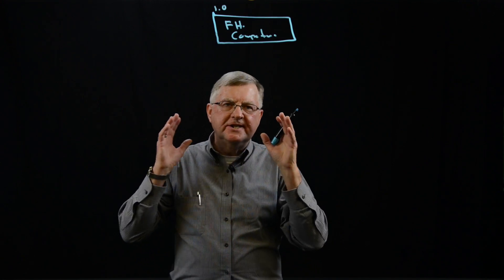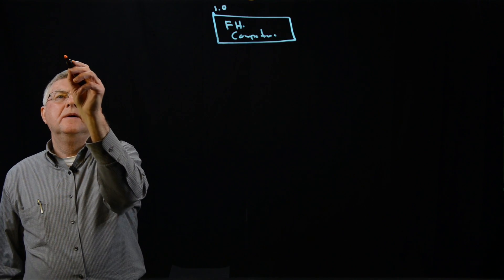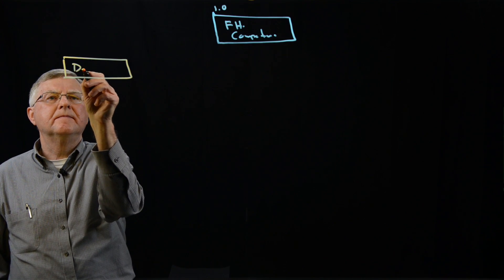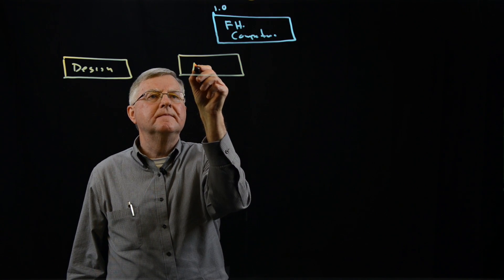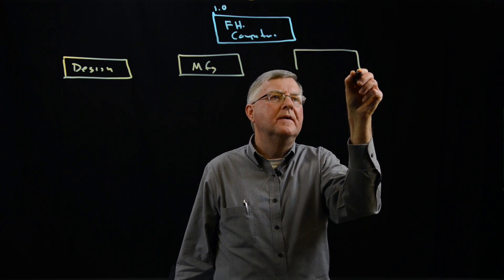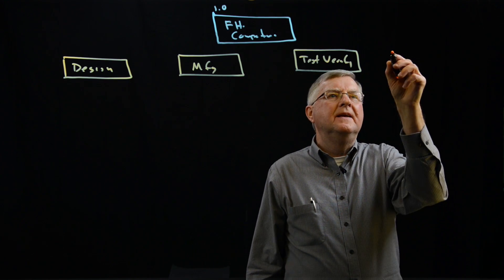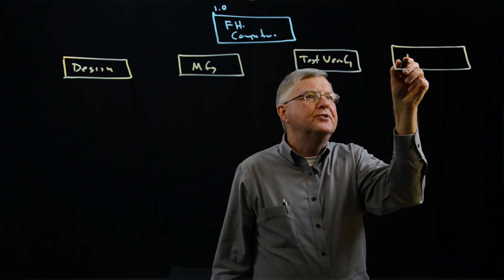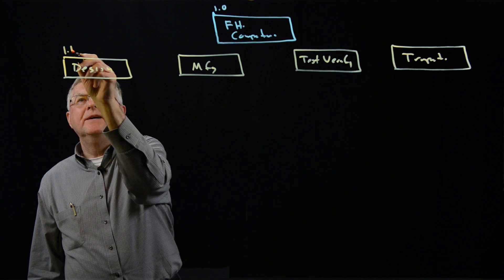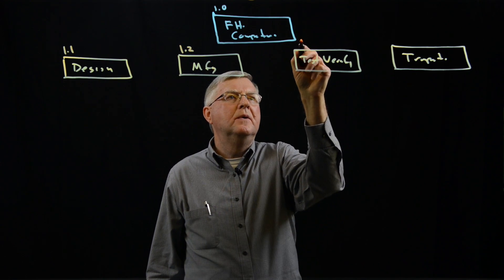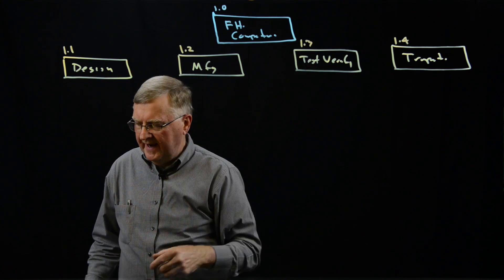There were four major segments of the competition identified by the project manager. One is design, the other is manufacture, the third is test verification, and the fourth is transport of the vehicle to the competition. We identify these as items 1.1, 1.2, 1.3, and 1.4 — still very general areas of the project, certainly not areas we can begin to assign resources or plan to.